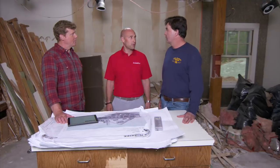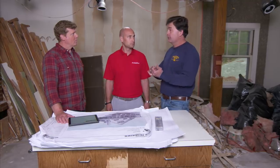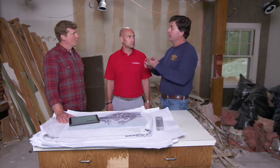As much as you're hiring an architect and a general contractor, you need to make sure that your insurance is in line and ready to go for the project you're undertaking. So if you hired Charlie, Charlie would hire the individual subcontractors, exactly, and make sure that they had the proper insurance. Right. Now, I have an environmental company that's coming in to do the demo. They come in and test all aspects, whether it's wall samples, ceiling samples, maybe some linoleum in a bathroom. They literally go around and poke holes everywhere, take samples everywhere, go back and test, and they will come back and tell us what has to be demoed properly by them.